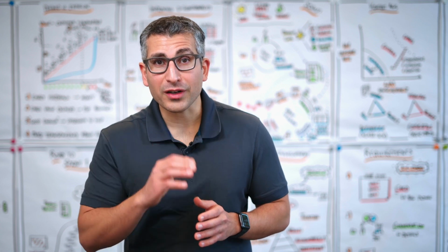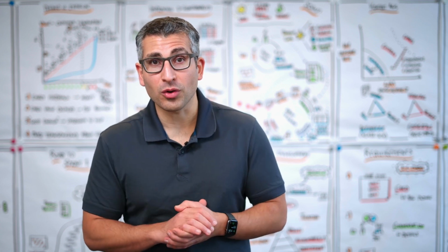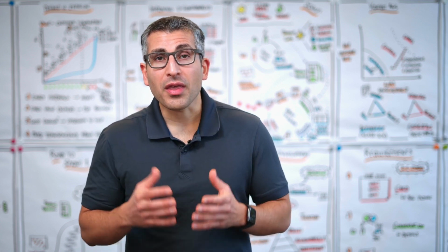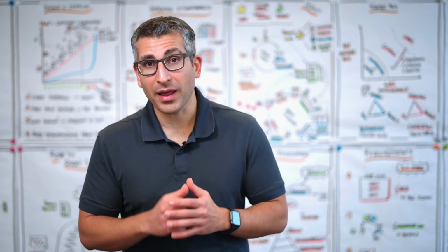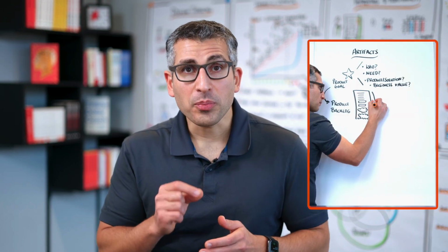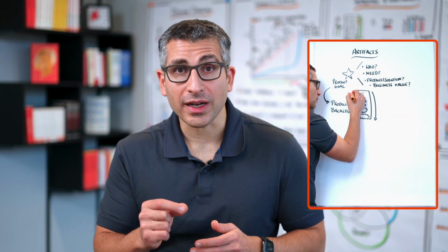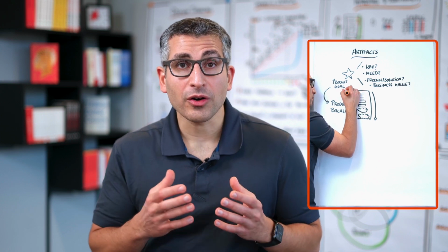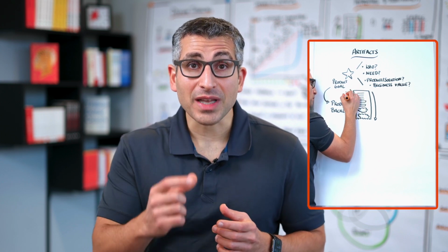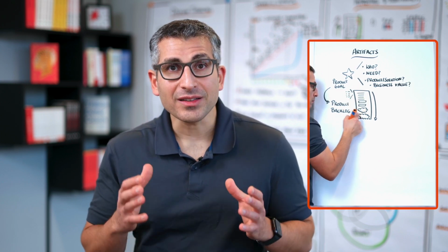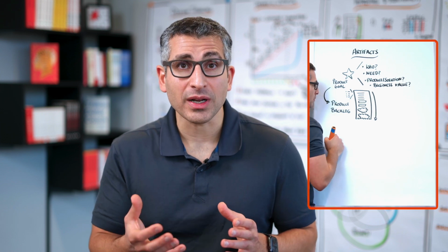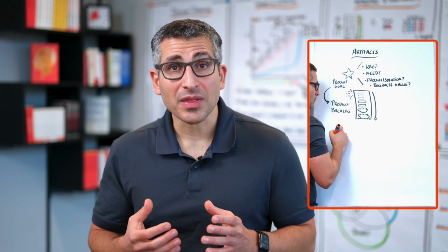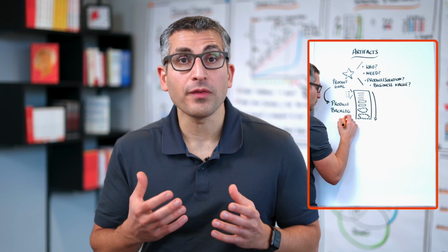So if you're a product owner or if you're working with the product owner, you should make sure that the following 4 things are in place. First, every product backlog should be prioritized. And based on that prioritization, the items at the top should be detailed down, including acceptance criteria, whereas the items at the bottom can be more vague.